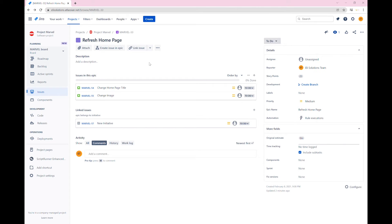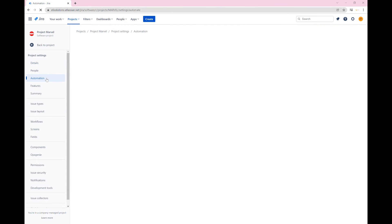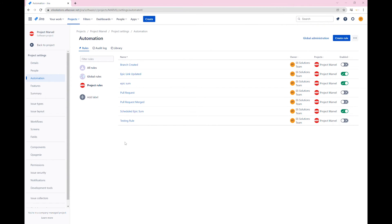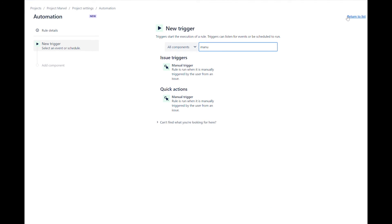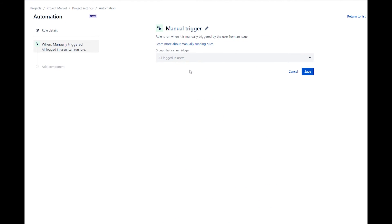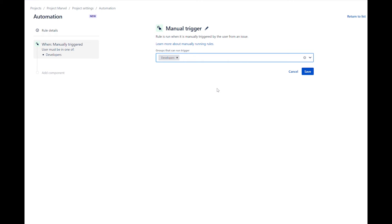Let's now create the automation rule. Go to the automation settings and click on create rule. Every rule starts with a trigger. Select the manual trigger. For the option groups that can run the trigger, select the developers group. Users that are not in this group will not be able to execute this trigger. Save the trigger.